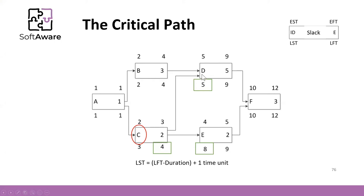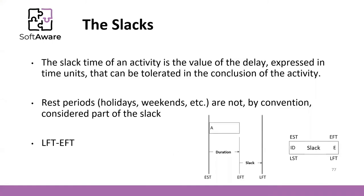The latest start time is calculated as: latest finish time minus duration of the task, plus one unit. So four minus two plus one gives three. We calculate it from the smallest number coming from the latest start times — in this case tasks D and E, and the smallest number is five, so the previous unit of time is four. Having LFT, we can calculate LST. With all these values — EST, EFT, LFT, and LST — it is possible to calculate the slack.